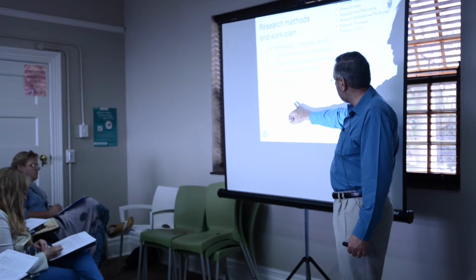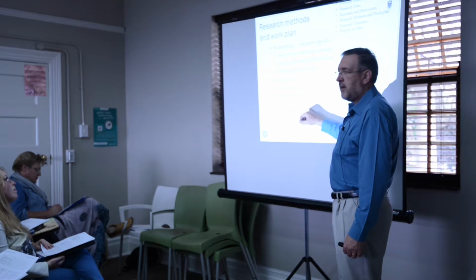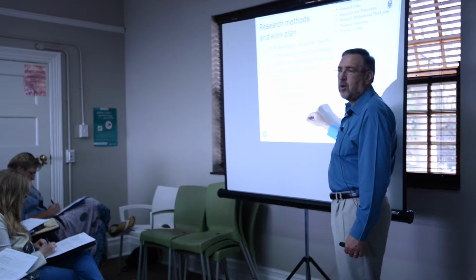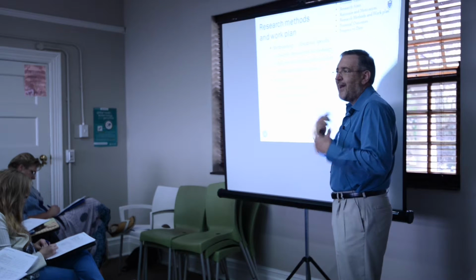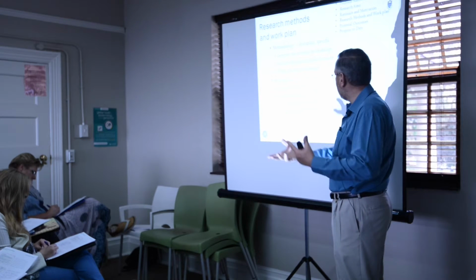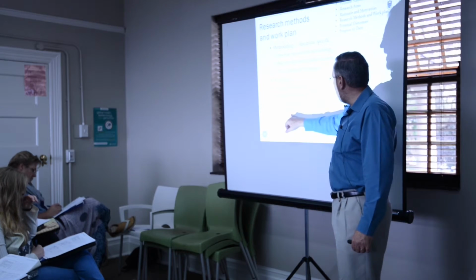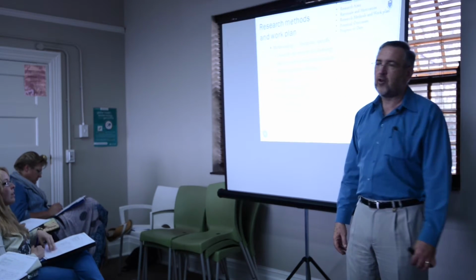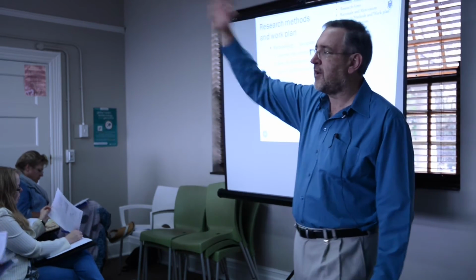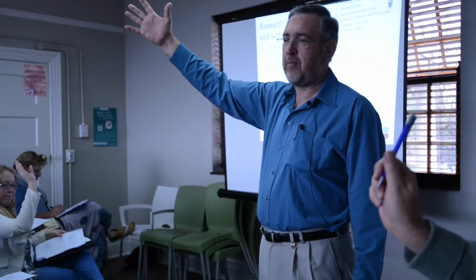A work plan must describe what, when, and with what or who. I just call it who. The resources, but also the equipment, access to fossils, access to testing equipment. And I like the use of a Gantt chart. Who knows what a Gantt chart is, or who doesn't know what a Gantt chart is? A couple of you, good.